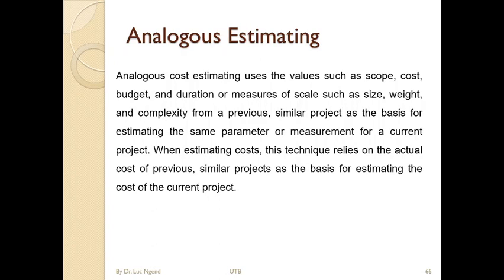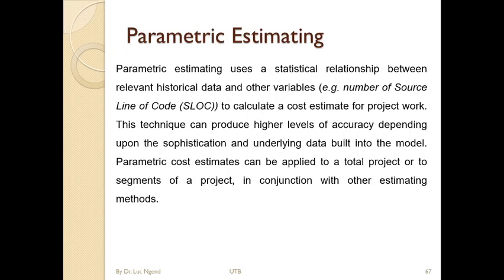project. So we don't mean that you give the same amount, but you judge the size of the company or the organization, you judge the duration, and so on, and even the size of the assignment. Now you compare with a previous similar project, and then you base your estimation on that. Yeah, so that is analogous estimation.